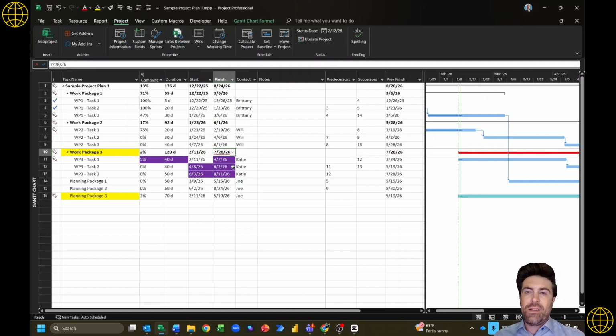One of the things I said about manually scheduled activities is that they ignore constraints and logical dependencies, and you can use fake dates in them. Another thing they're troublesome with is that when a summary task is a manually scheduled activity, it does not update and inherit all of the properties of its subtasks, which is not a good thing.